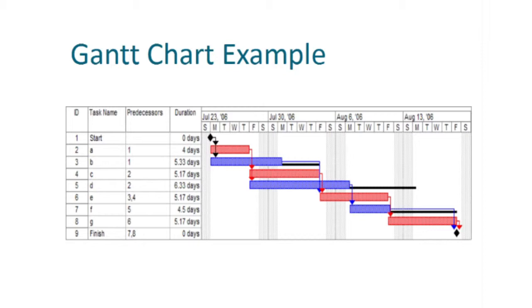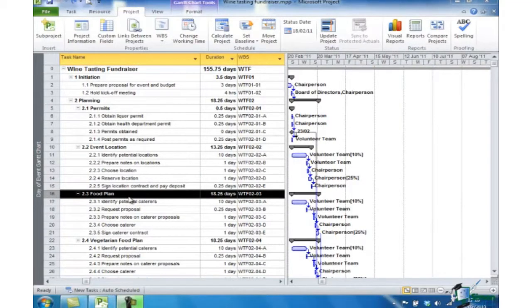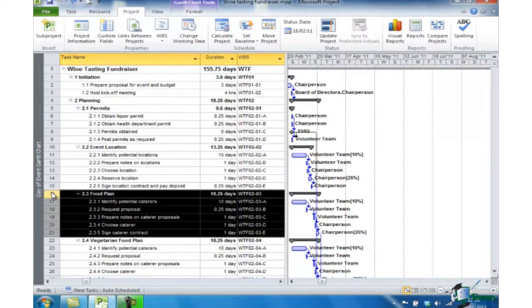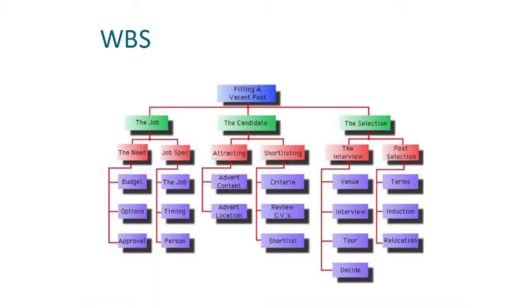The final aspect of the planning phase is developing the work breakdown structure, WBS. This is commonly developed in Microsoft Project as well. The WBS identifies the tasks needed, the time associated with the task, and it will also identify all the tasks you must meet to fulfill a given scope. This also identifies hidden dependencies. It is also used as the base for assigning resources and deriving time estimates. An example of a WBS is seen here.